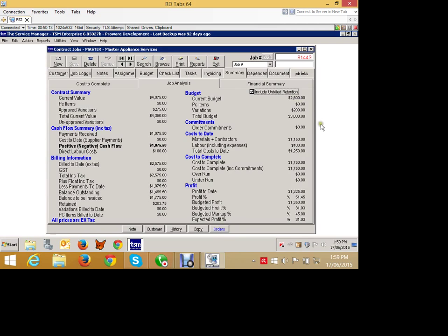Okay? I'll say that again. Remember I had a $1,000 invoice and I took 10% out for $900? So I've only got $900 in revenue. So do I want these profit calculations based on the $900, or if I include the unbilled retention, based on the $1,000? So if we see $900 without the retention, I got 1121.25 profit.